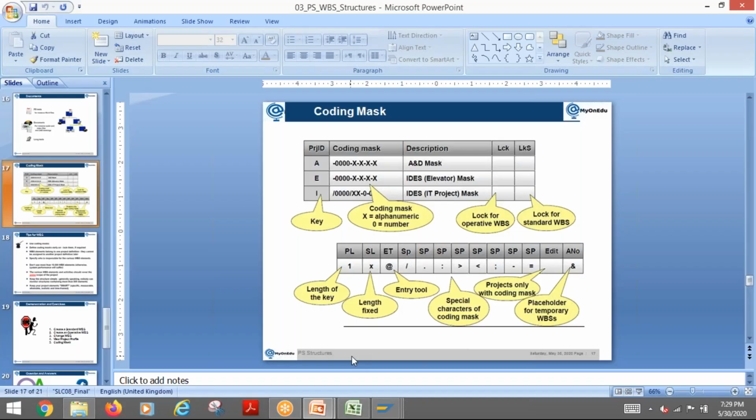One more issue: if we go for 6 and 7 levels, those levels are only 1 digit. If there are more than 9 WBS elements at, for example, the third level, like 1.1, 1.2, 1.3, one digit is enough up to 1.9 only. Sometimes only 3 or 4 children will come up to that level, but it is also very difficult.